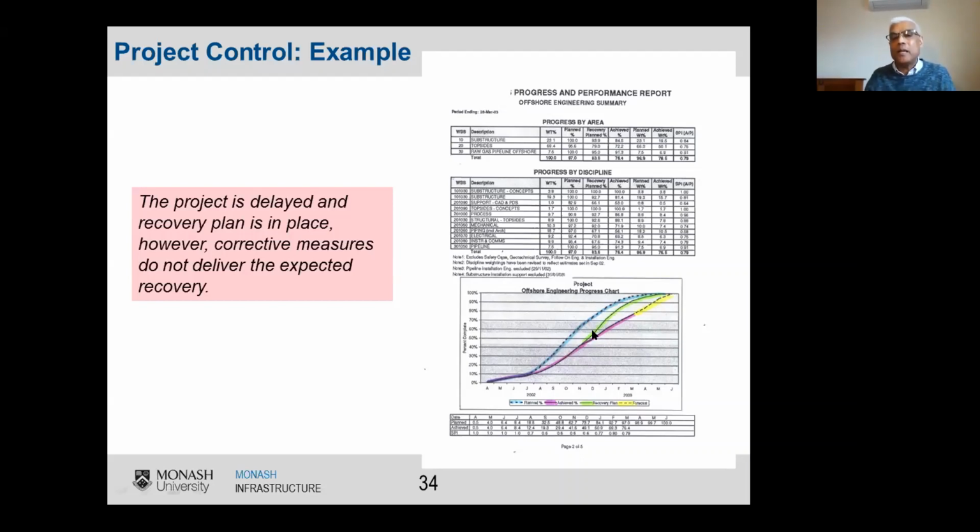So you might not be able to. So that's why the control measures need to be done early in the program, early in the schedule. You should not wait until, for example, 8 months have gone, because the damage has already been done then. So when you do the control measures, you need to do it early in the process.